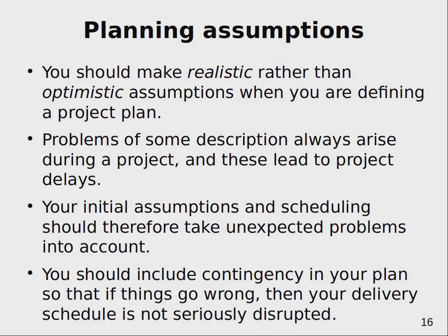The only drawback for such an approach is that if you want to bid for the lowest cost of different kinds of projects and you are too pessimistic, probably your estimation for how much it will cost and how long it will take will not be the lowest possible bid for a particular kind of project.